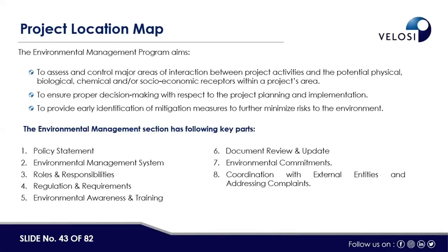Yeah, and we have received multiple questions regarding the responsible person for preparing the EMP. So is it a part of the project department or a separate team which prepares the same? Actually, there are different scenarios in different regions. In our region, the environmental management plan must be prepared by a consultant approved by the regulatory authority. It cannot be developed by the internal team or the project team. It must be prepared by an external consultant. And yes, review or update can be done internally, but the initial submission and the approval of the EMP must be by an external third-party consultant.